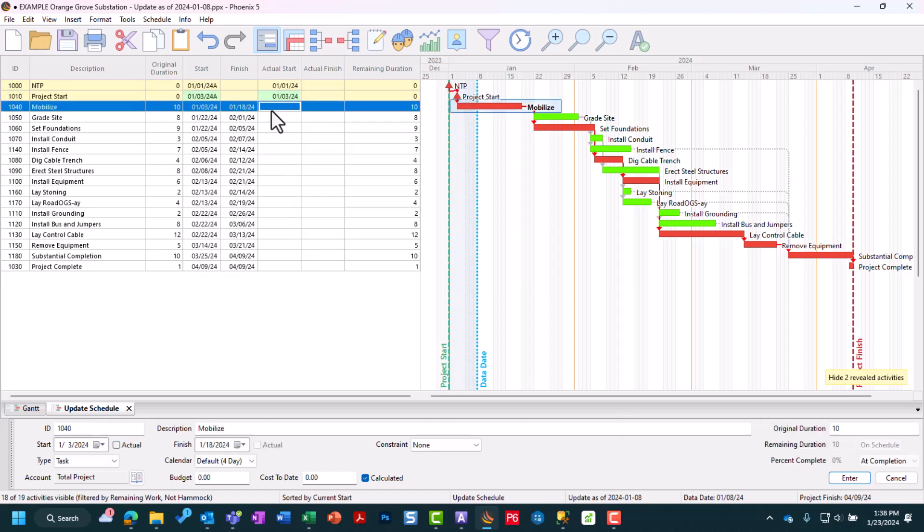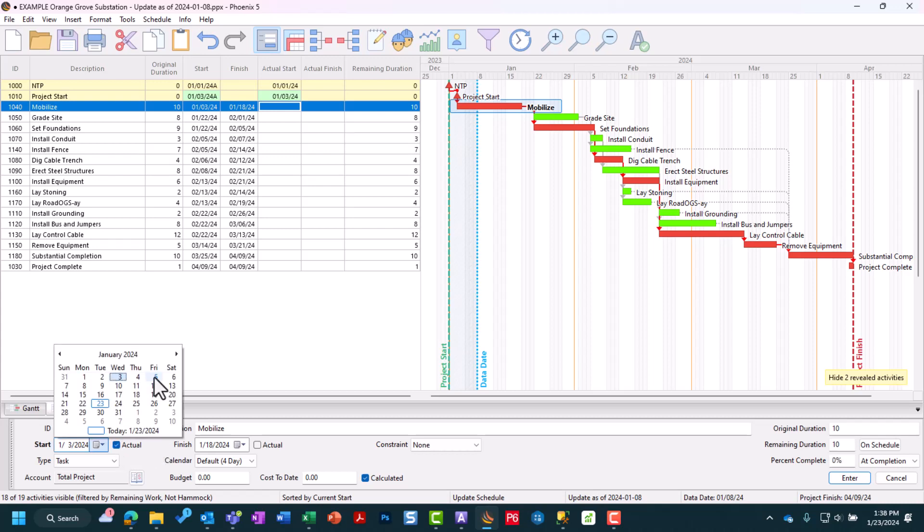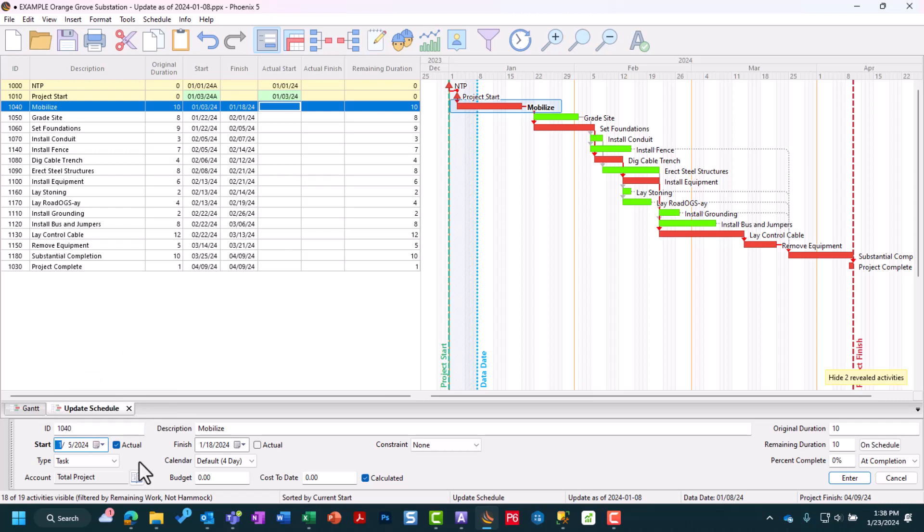Continuing to Mobilize, however, this time we did not start on time. We were supposed to start on the 3rd. However, we got delayed two days and started on January 5th. Since our update period is until the 8th, we don't know whether we've finished yet. We still have remaining work.